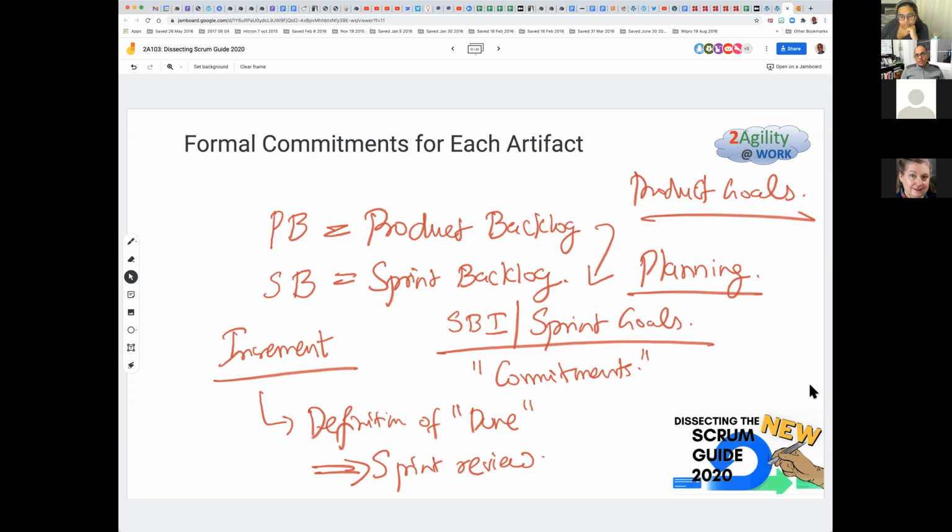So they can say, in the next sprint, I'm going to build these 4 or 5 features in the next 3 or 4 weeks and test them on the emulator, so that I am ready to meet the overall product goals when the hardware is ready in the larger context. So that becomes the sprint goal.